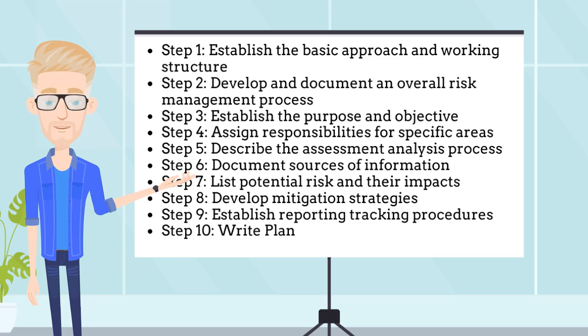Step 6. Document sources of information. Step 7. List potential risk and their impacts. Step 8. Develop mitigation strategies. Step 9. Establish reporting and tracking procedures. And finally, Step 10. Write the plan.